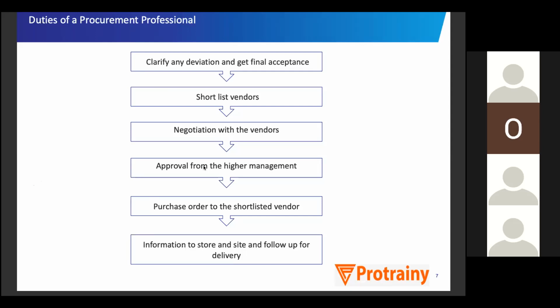And if you are doing it nicely, you can think how much aggregate is used on a project site. So you will be saving a lot, and if you are not doing that, you will be losing a lot. On any project site, 40-50% of the whole cost of the project is in procurement, related to material and services. So if you control this part, everything else will also get controlled automatically. That's why it's a very major function of a construction project.